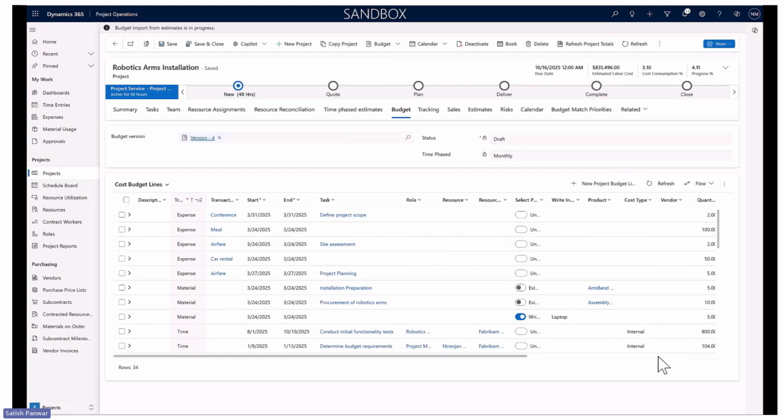The actual amount and actual quantities are updated as per the matching. And we also saw how a project manager can update the forecast, and how the consumption percentage and progress are updated. And in case there is a change of plan or additional actuals are available which are not covered by the budget lines, you could revise and also create budget lines from unbudgeted actuals.